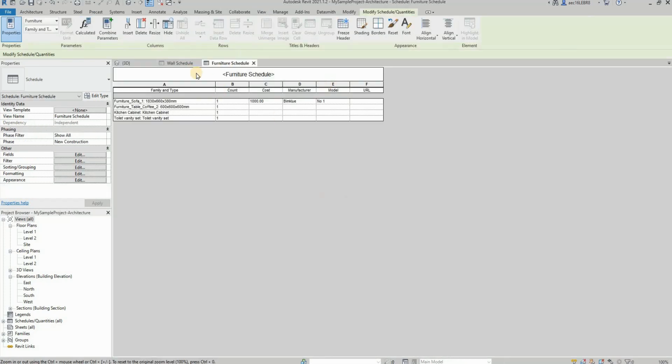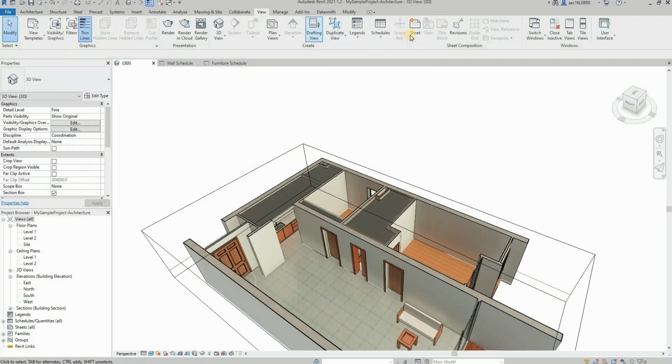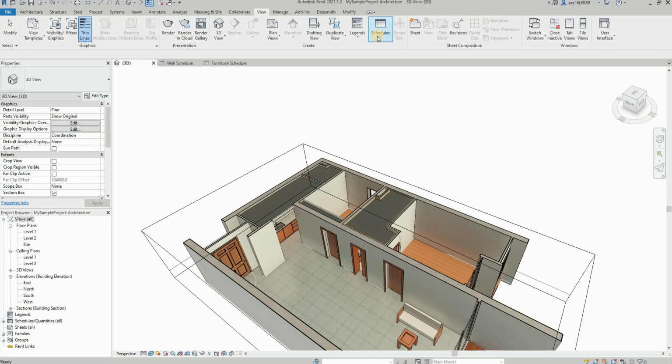so the next thing is, of course, I'm trying to extract the tile. For tile, we can go to this schedule quantity. Let's say I want to extract the tile in meter square. How many meter square of tile have I used? Okay, so if you scroll down this schedule quantity, you don't see anything related to the material. So for material-wise, we need to use the material takeoff.